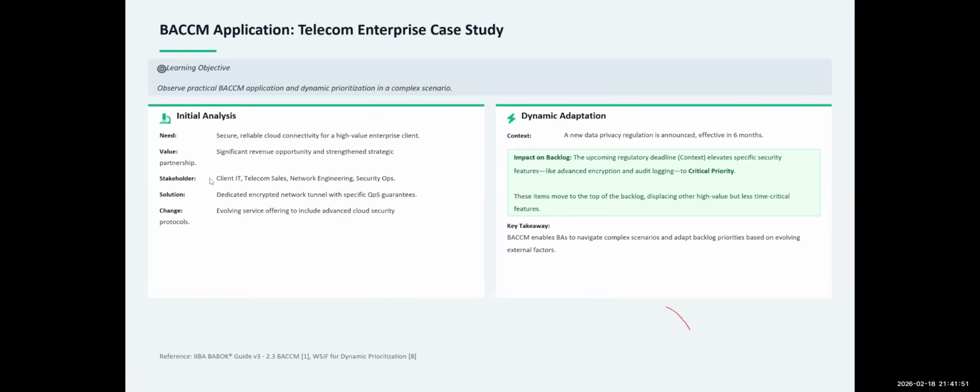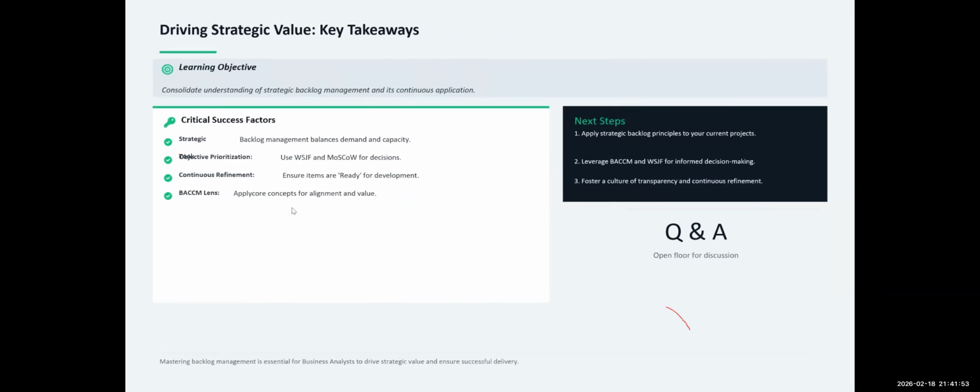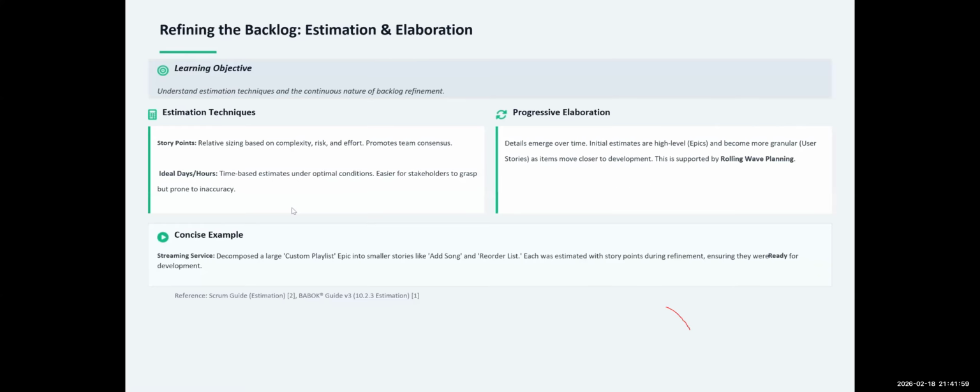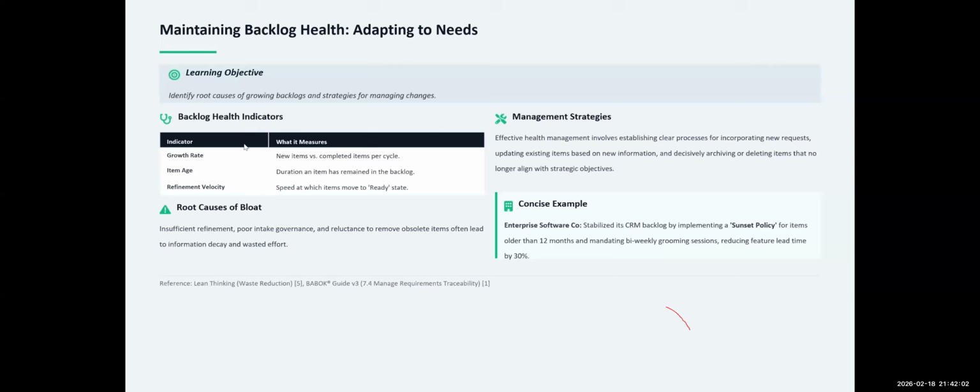Remember, we talk about that the health of the backlog is very important. Otherwise, the product owner will just keep dumping things there and then nothing is going out. So the BA has the responsibility of ensuring that place is clean, stabilized. Then all items that are aged are actually taken out, right? Like recently, we took a decision in my organization for items that are more than 1 year to be purged out. Just delete all of them, right?